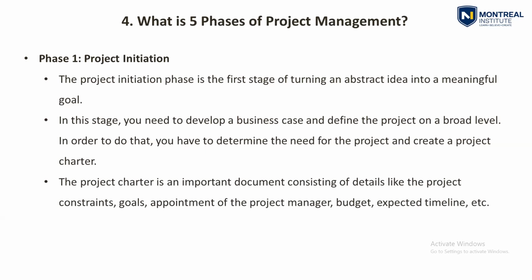The project charter is an important document consisting of details like the project constraints, goals, appointment of project manager, budget, and expected timeline. So in one sheet, the client will know the constraints or the risks of the project, and will understand the goals of the project, whether his idea is going to be a meaningful product at the end.